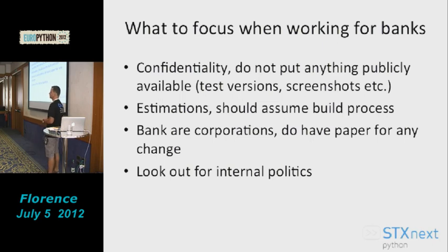Estimation should assume the build process. It costs us, so usually when a bank asks for a small change that takes half an hour, it is estimated at least 1 day, because 1 day is necessary to do all the test and distribution process. We have to learn it because we are not used to it for small changes. Banks are corporations, so they have paper for everything. You don't need a signature, but just confirmation in email, or basically we use Bugzilla, so it has to be in Bugzilla.